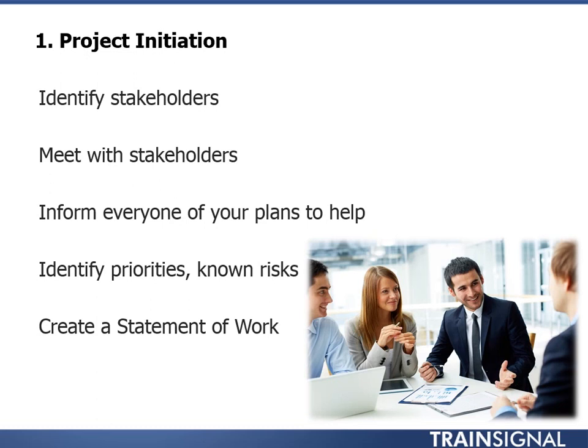And you'll take this information that you gather and you'll create a statement of work. And in any project, the statement of work is just a long list of what you're going to do. It's a commitment. It's saying, I am going to scan the networks and do my best to identify important assets, risks, and vulnerabilities. I'm going to use these types of techniques to scan for them.